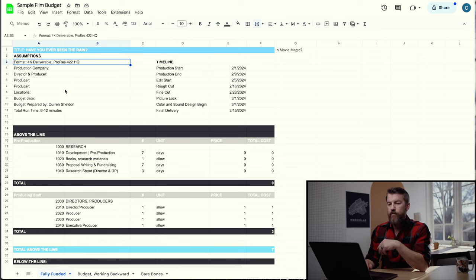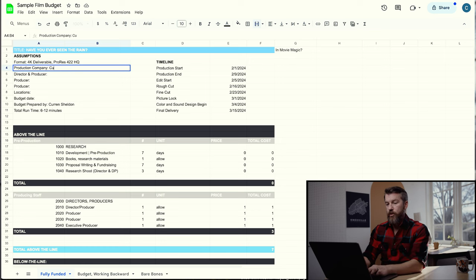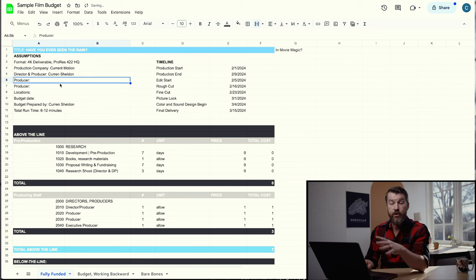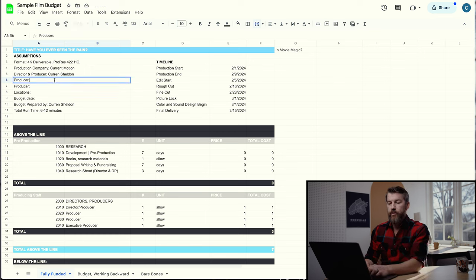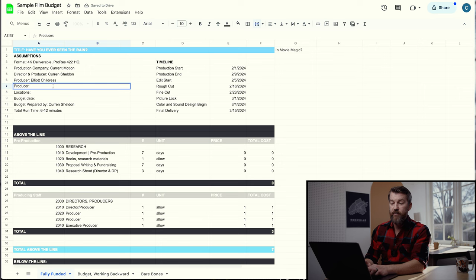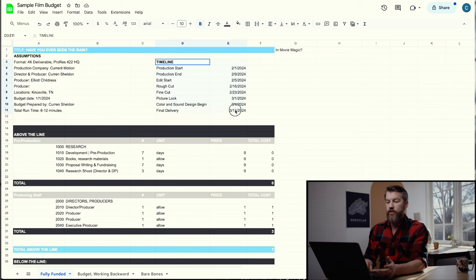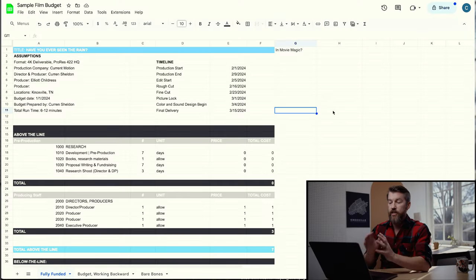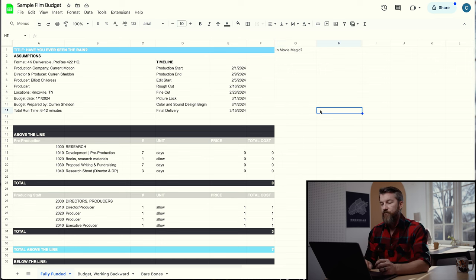In the assumptions section you have format and deliverables — for example, a 4K deliverable in ProRes 422 HQ, which is usually required by a streamer like Netflix. Then the production company — I'll put in mine, Current Motion. Director and producer — I'll go ahead and direct and produce this one. Most directors also do some producing. And then over here is the general timeline: when production starts and ends, when the edit starts, rough cut, fine cut, picture lock, color and sound, and final delivery.